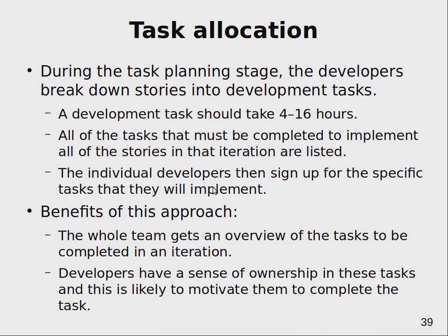And the only difference particularly for task allocation, and I think that's a good thing, is that particularly for Scrum, if you are a proper Scrum master, you just put new tasks in this backlog, and then the members of your team or of your project actually pull out some of these tasks and start working on them as they wish.